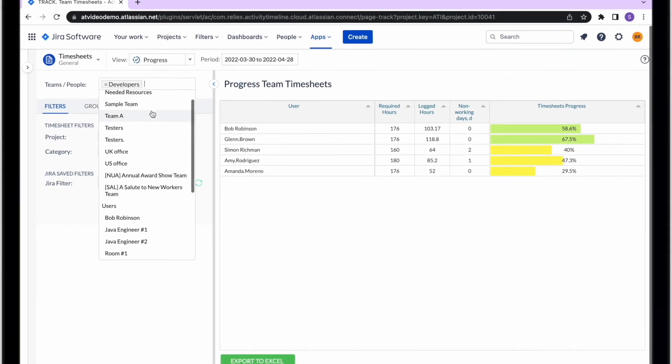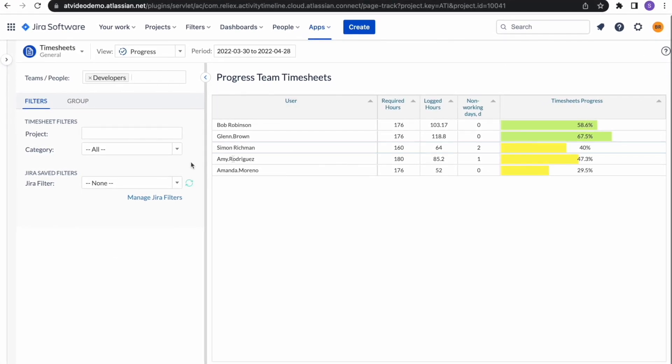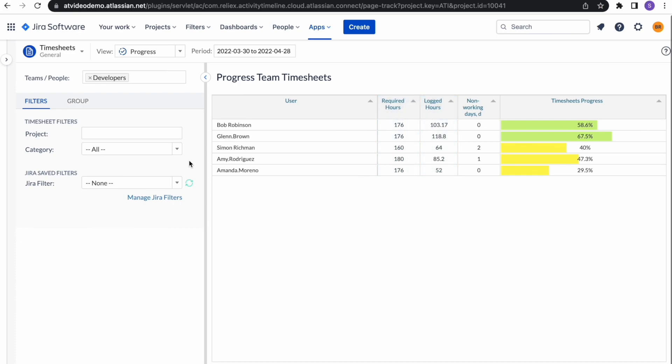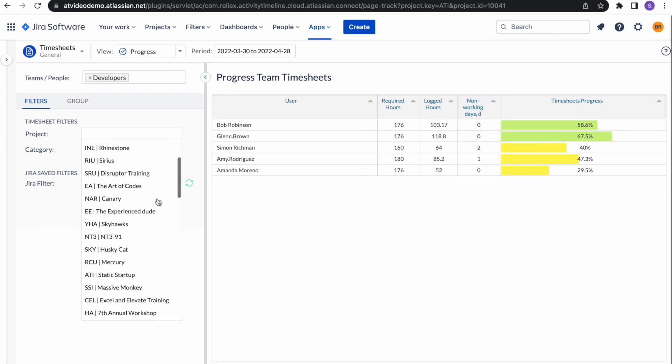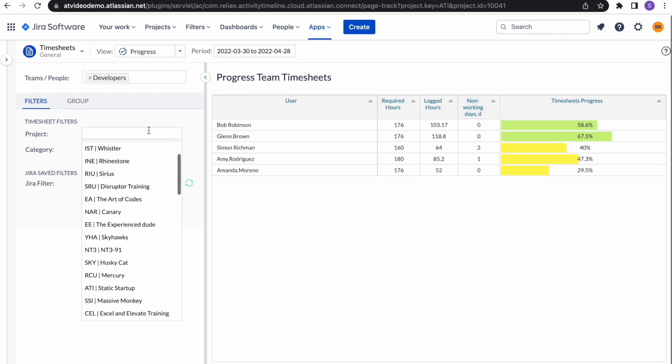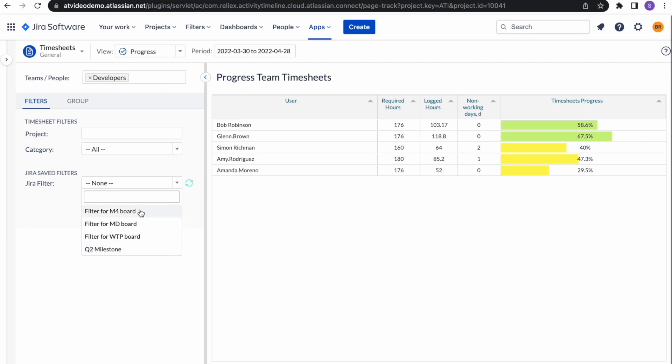Progress report is great for high-level tracking, where you can easily see how many hours the user had to report and what's the actual number of hours they logged. Here you can also see the number of out-of-the-office days during the period, as well as for all or specific projects. Reports can be created not only for projects, but you can also use Jira-saved filters to report on any set of Jira issues.